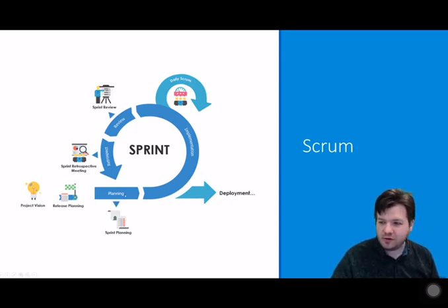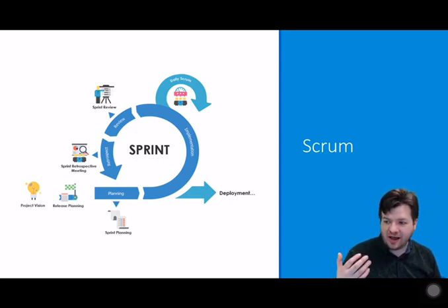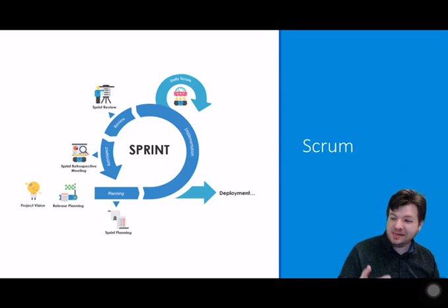Then you have your team members start working on those stories. You will work for a period of time, maybe a day, maybe multiple days, and then you will have a scrum meeting to check on progress and see, okay, what stories have been completed? How far along are they? Are you encountering problems or blockers that need to be dealt with? So you can track within a sprint how well progress is being made.